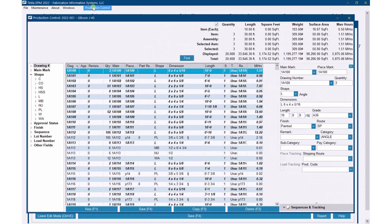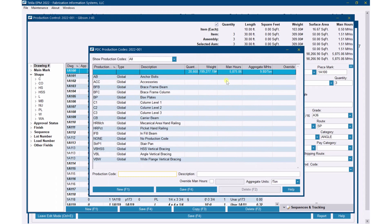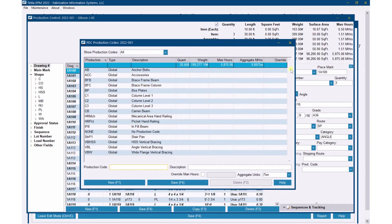Obviously we're linked to the estimate. If I go to production control, drop down review, and then production codes — this is something many of you may not have turned on or know about. You can see that a blank production code is 9.8 man hours per ton. I've done nothing with production codes in either the estimate or production control, so it's just using man hours per ton multiplied by the weight of every piece — and that's how it's getting the 5,875 hours.